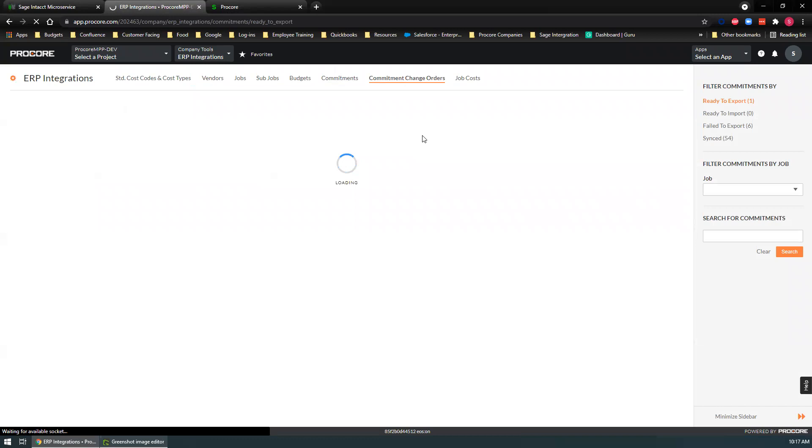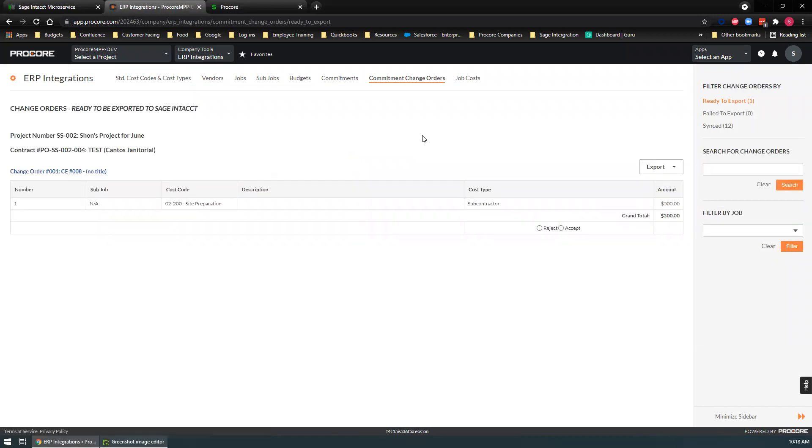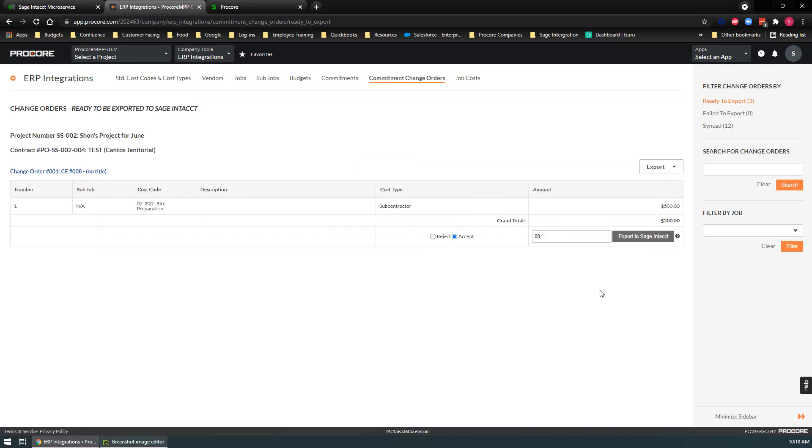Commitment change orders. Whenever you make a change to an existing purchase order or subcontract, you would accept this and export it over to Sage.